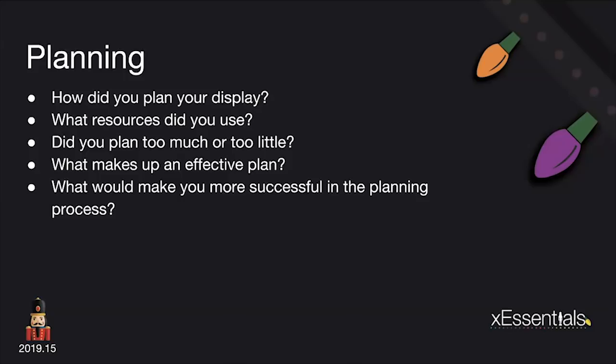But because I live in a neighborhood where there's a very tight set of rules for the community association, my plan of how I attach my props to my house turned out to be completely inadequate. So I had to engineer special ways of mounting stuff because when the 15th of January rolls around, they cannot see any mounting points and they can't see any leftover hooks or anything that's not painted, etc. So you can plan all you want to, but you're still going to find some holes.